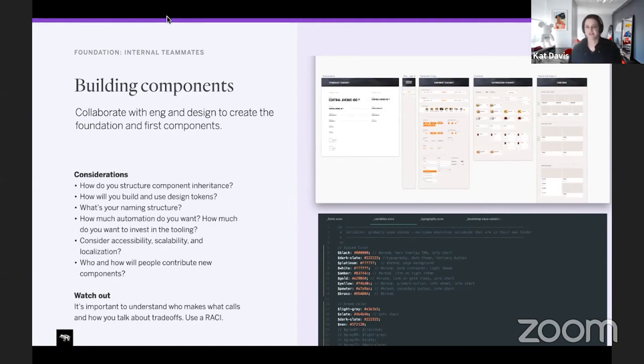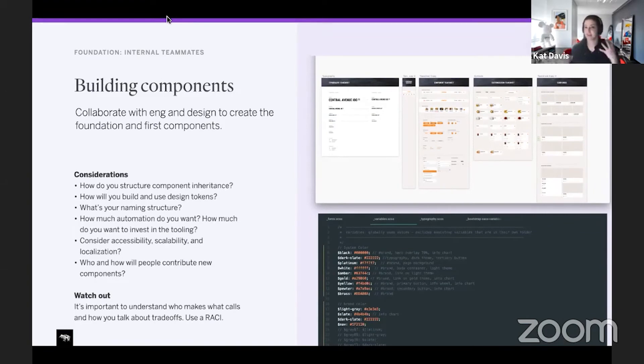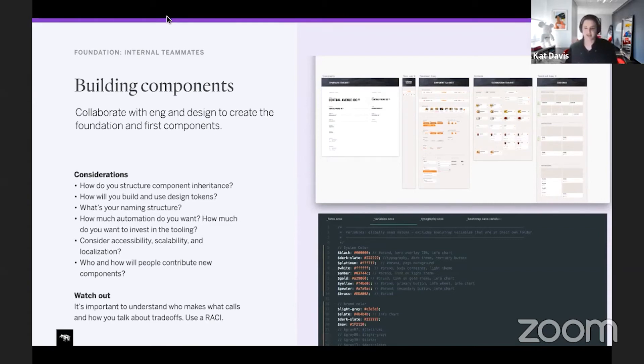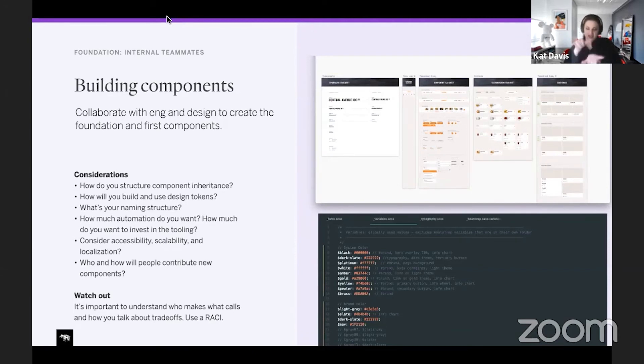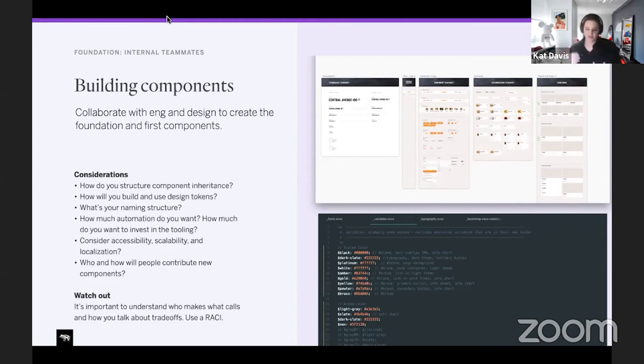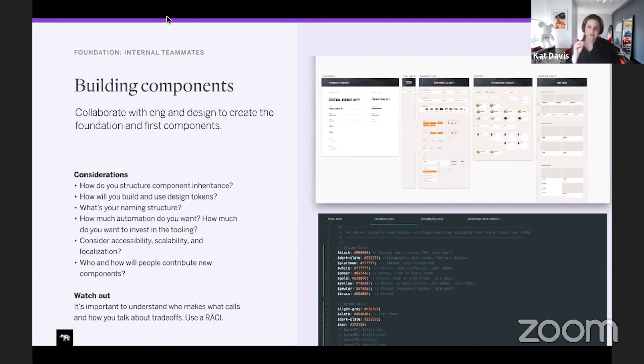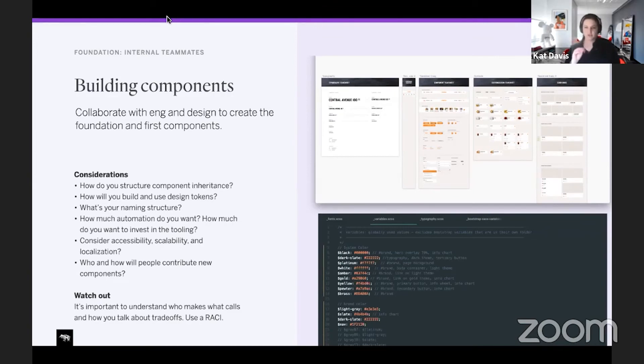Really important in this phase to think about a RACI and establishing a RACI because you're going to be making trade-offs in this. One of the things on our recent project, we had a component that we built out that was supposed to be two components stacked side by side. We ended up having to not layer them side by side, just because it was going to take much longer time on the backend to get that rolled out. So a lot of compromises here, but if you build out the components in the way that you want to see them out into the market, you can iterate on this. This is really important to set that foundation at first.